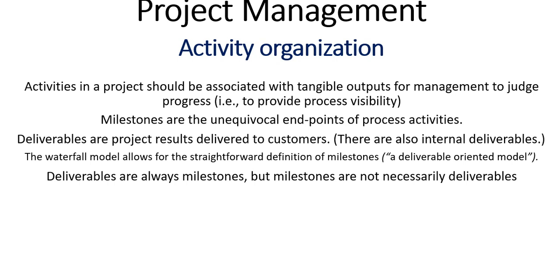Deliverables are always milestones, but milestones are not necessarily deliverables. Right. Deliverables are always milestones. So the moment you deliver something, it means you have reached a certain stage. So you can actually tell to say, these guys have reached this stage. But now, milestones are not necessarily deliverables. Sometimes we can actually reach a milestone that is a prerequisite for another activity. But it may not be a deliverable.